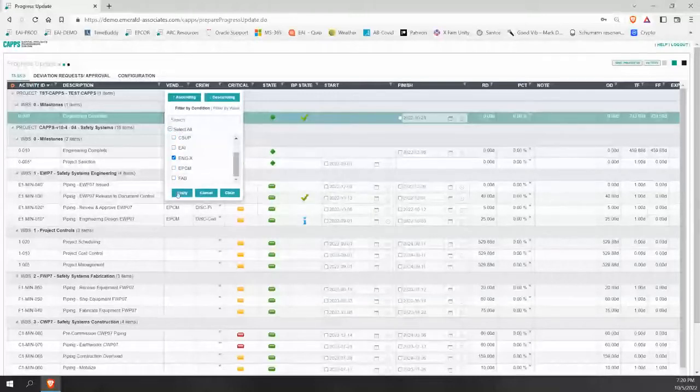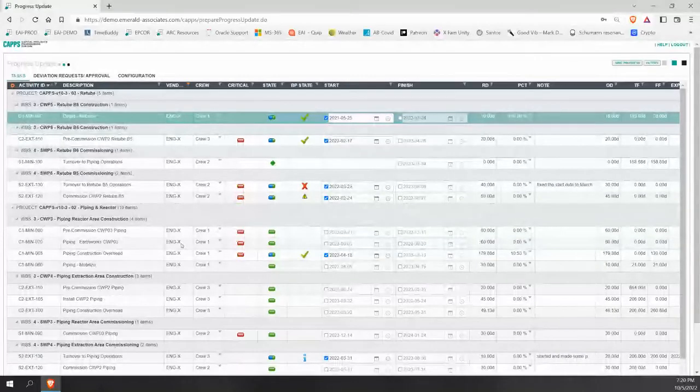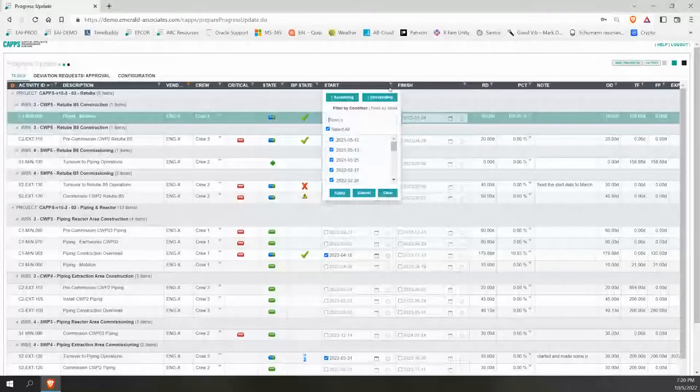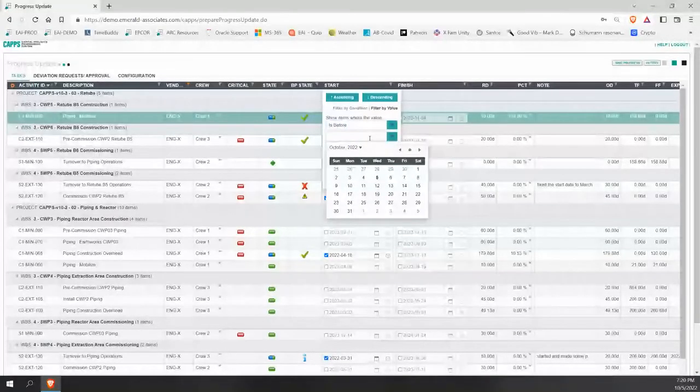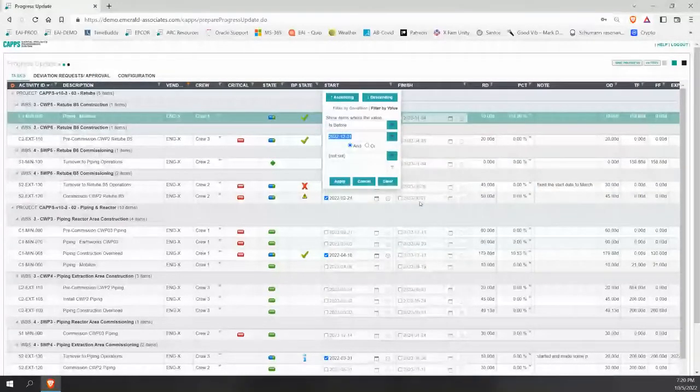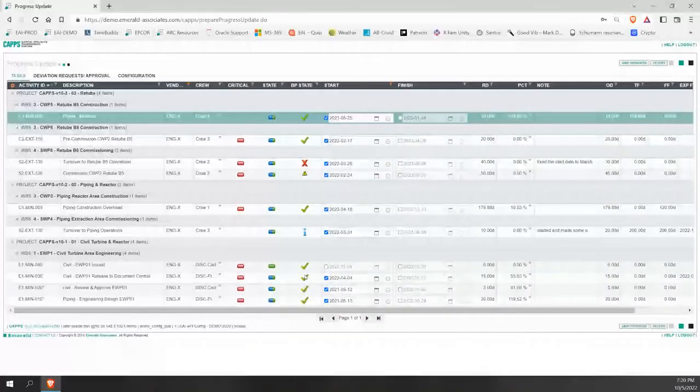It's like just pull a filter and I get their activities on the screen. I could even do a look ahead filter. So some of you might be familiar with doing look aheads. So is before, and we can put a date in there. Okay, so I'll say, give me anything coming up, let's say in the next 2 months, and I can filter that down. Okay, so very simple, very lightweight, not very complicated, and easy to kind of get that filtered down. Okay, so then I could start doing my updates.